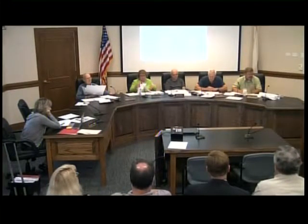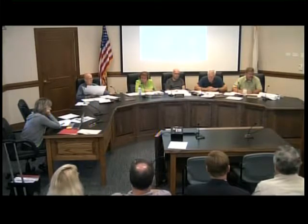We did look at an option with the driveway over in this location here. It requires a very massive drainage and grading around the site, and we gave it to you. Then we costed it up, and it ended up being like $25,000 to $30,000. And quite frankly, it has more likelihood of impact to the wetland than what we got. It wasn't a financial loss exactly. The need to terrace in order to make the driveway work resulted in more potential for negative impact, based on stormwater runoff. So, as illogical as it might seem, the porous pavement on that side provided far less impact than a directed sheet flow that ended up being much steeper with higher velocities getting down into that resource. Correct.